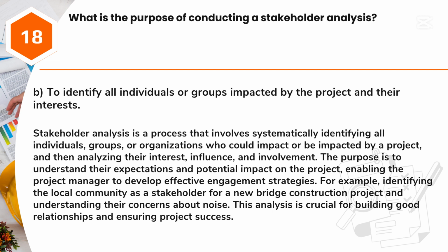Answer: B. To identify all individuals or groups impacted by the project and their interests. Stakeholder analysis is a process that involves systematically identifying all individuals, groups, or organizations who could impact or be impacted by a project, and then analyzing their interest, influence, and involvement. The purpose is to understand their expectations and potential impact on the project, enabling the project manager to develop effective engagement strategies. For example, identifying the local community as a stakeholder for a new bridge construction project and understanding their concerns about noise. This analysis is crucial for building good relationships and ensuring project success.